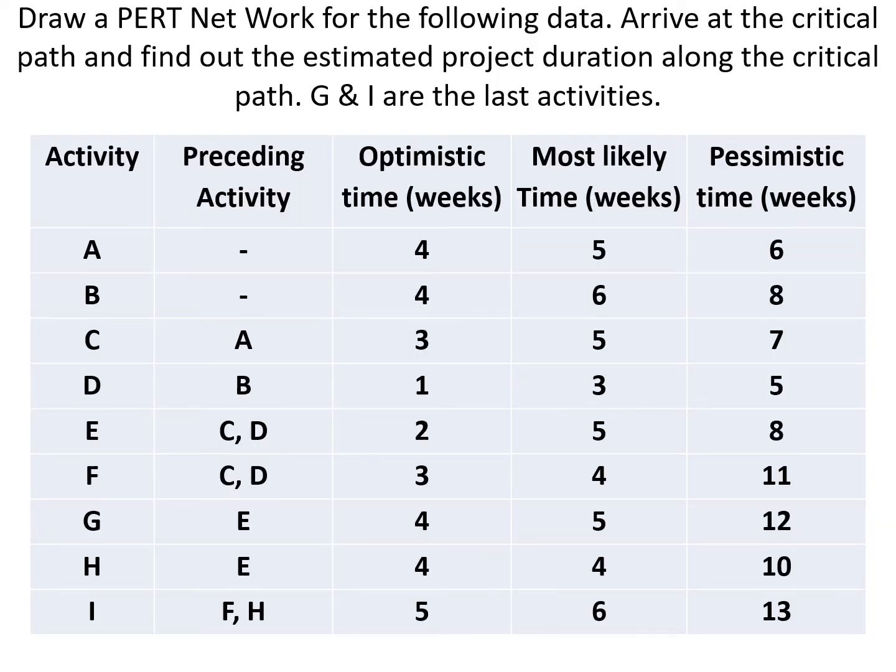rather than start and completion oriented, and is used more in those projects where time is a major factor rather than cost. It is applied on very large scale, one-time, complex, non-routine infrastructure, and on research and development projects. PERT offers a management tool which relies on arrow and node diagrams of activities and events. Arrows represent the activities or work necessary to reach the event, or nodes, that indicate each completed phase of the project.